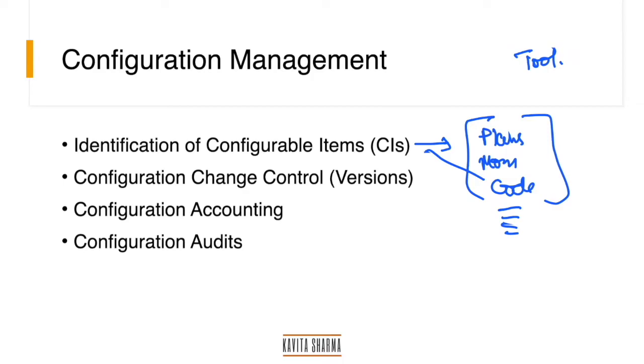There has to be some kind of tool which you're gonna be using. In case the organization does not have any tool, we typically use file servers. In file servers there is a directory with the project name or project code, and then we have plans, documents, test results and so on. These kinds of directories are made. In case we have a SharePoint server, we create a portal for our project and then under that we have different files listed.